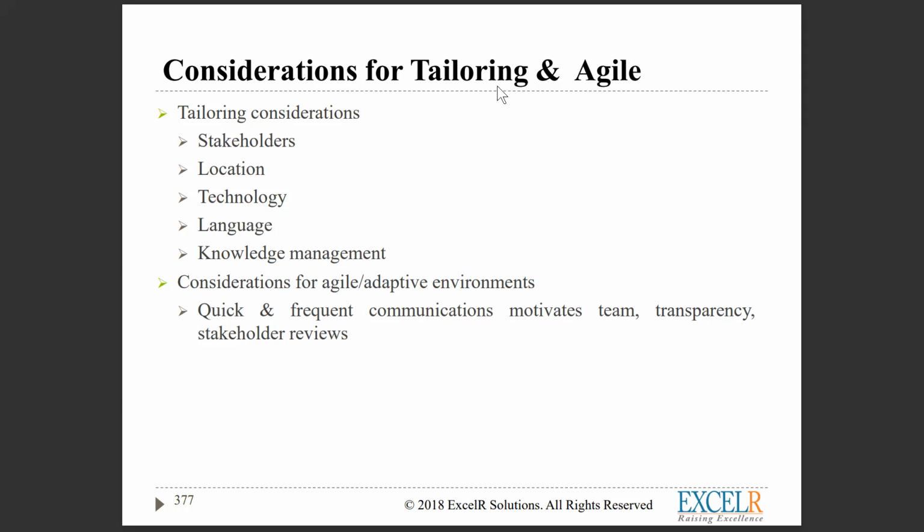And we send multiple reminders. At the end of 3 reminders, we inform the concerned stakeholders. Escalate. Project manager's job is to escalate. If no one is hearing, escalate. So these are common issues we face, especially with Middle Eastern clients.